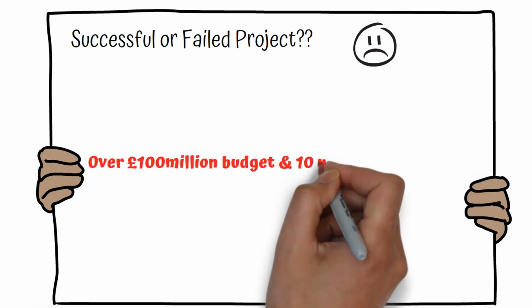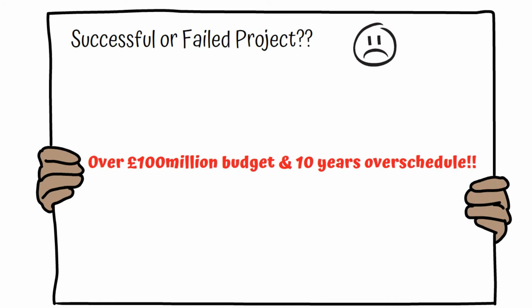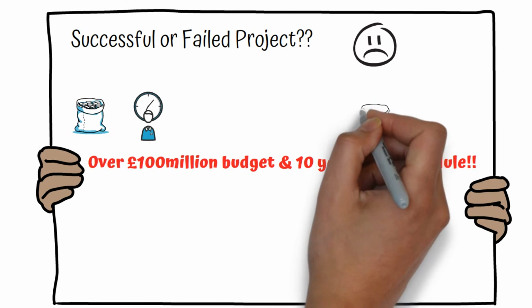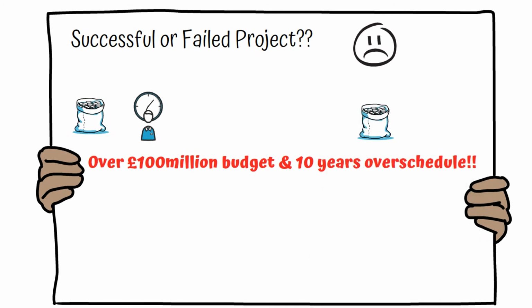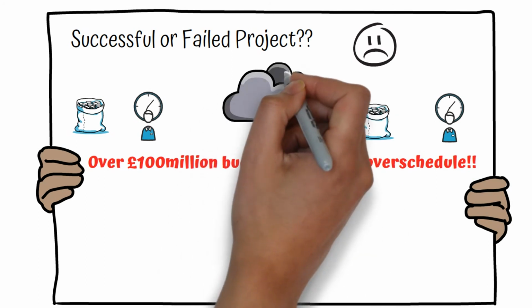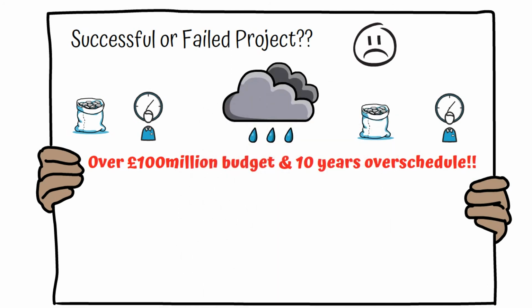As the project went on, more problems arose. These issues meant the project was delayed and started to become over budget. Despite the entire project being predicted to cost $7 million, when the Opera House was completed in 1973, the cost amounted to over $100 million and was 10 years over schedule, having been estimated to be completed in 4 years by 1963.